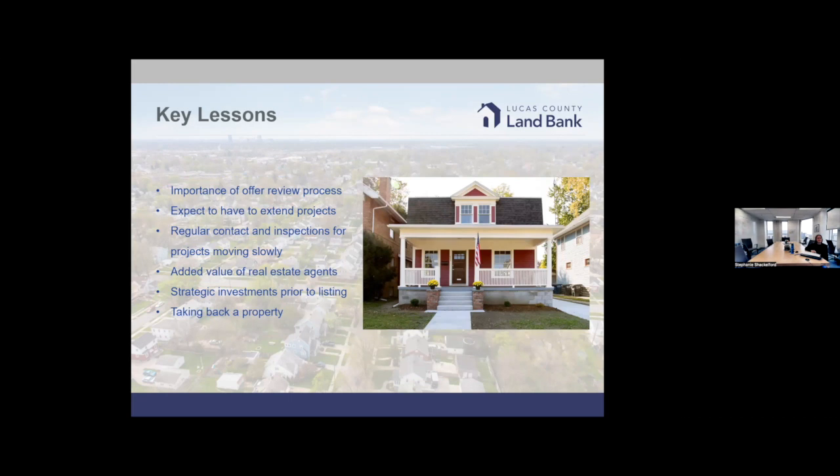We ask a lot of questions on the front end. We're not necessarily looking for them to match a magic dollar figure estimate for us, but they need to be making sure they're hitting the marks of all of the major things that need done to the property, like a new furnace or new roof, major systems work, things like that. But if they say that, but they don't give us a realistic price for that, we definitely keep that dialogue open, ask for quotes, things like that.